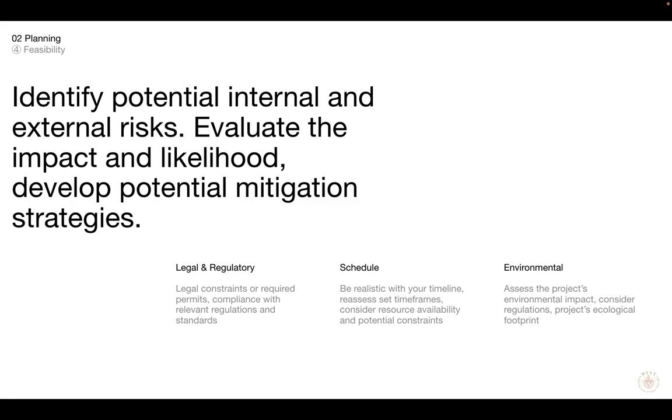Essentially, during this stage, you're creating a risk assessment, and through this risk assessment, you can summarize areas of potential risk, analyze them, and provide clear recommendations on whether you need to proceed or not, outline the next steps, note if alternatives are needed, or just say the project is really not feasible due to this. And that will also give you clarity either way.